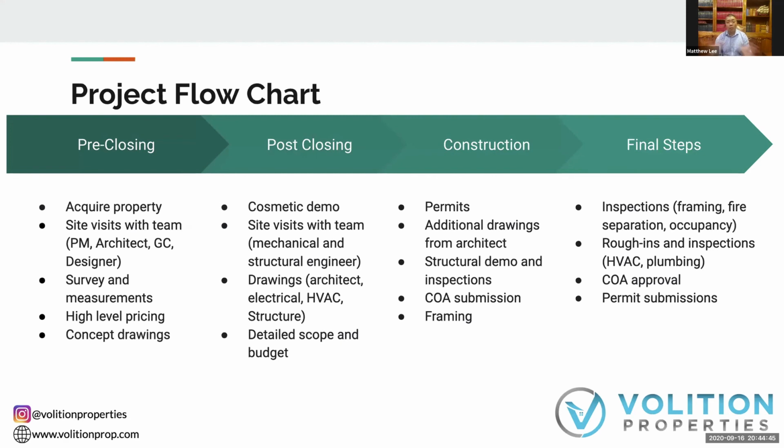And I'm oversimplifying this because there's a ton of restrictions. Like, every subsequent unit must be smaller than the units preceding it. And we have to make sure that we're showing proper fire separation and exits, entrances, egresses, and fire refuges for each of these units. But we are doing it in a phased approach. That way we're avoiding development charges because we are allowed to add incremental units. And it's not like this is some sort of backdoor that we're